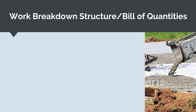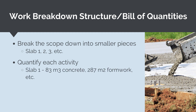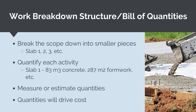The first step is to prepare our work breakdown structure and bill of quantities. We want to break the project scope down into component pieces. For example, if the scope we are pricing has several different concrete slabs, we could break the scope down into slab one, two, and three. Next, we measure or estimate all of the key quantities for each activity — for a concrete slab, that means cubic meters of concrete, meters squared of formwork, tons of steel reinforcement, and so on. It is important to get these quantities right because they ultimately drive our cost.